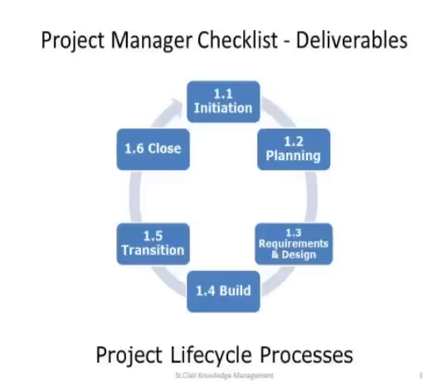And then finally, the close. This is where we've introduced a new document, a new IT system. We've built a house, we've built a data center. Everyone's happy with it. We're monitoring it for any snagging or problems that need to be sorted out. And then the project is closed, the team's disbanded, the budget is, well, the actual cost is calculated, the final report is produced, and our work is now done.